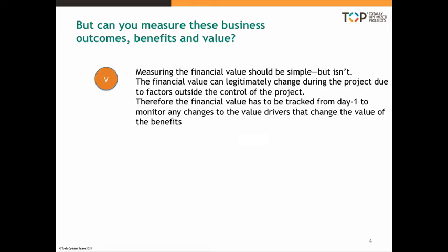You need to know at the time of realization what level of value is available. In one particular case, we had benefits of 42 million for a particular project, which was customer based. During the course of the project, the company lost almost half its customers due to adverse publicity and a range of other factors. So the value of those benefits almost halved, not because the project didn't deliver, but because one of the key value drivers had changed.